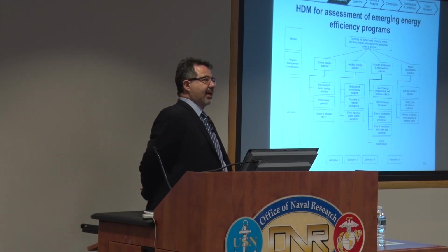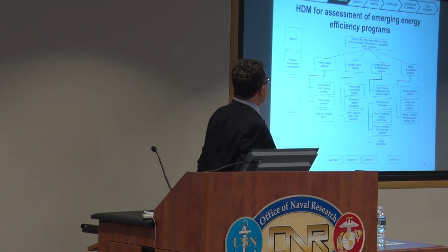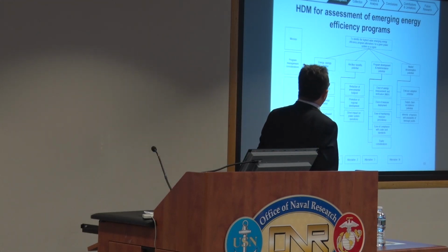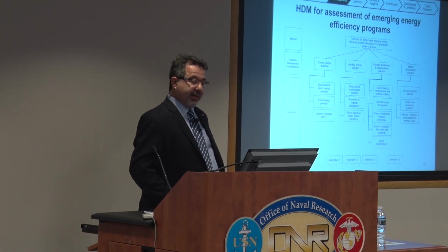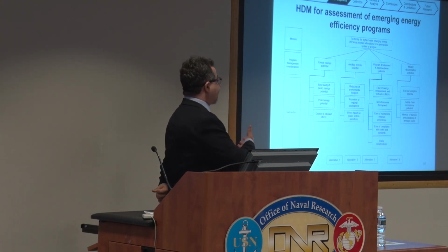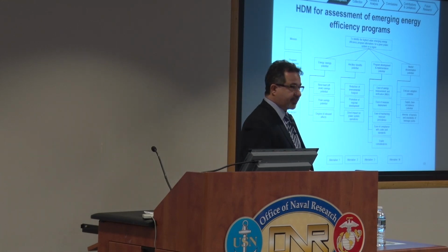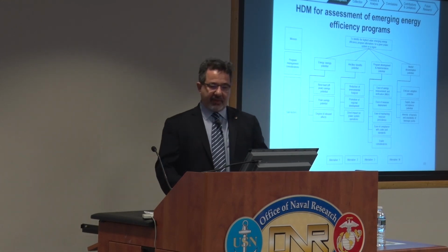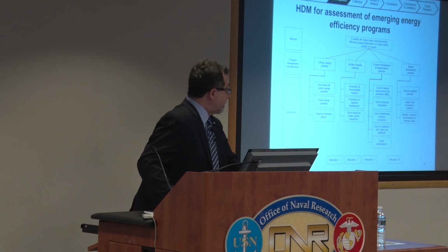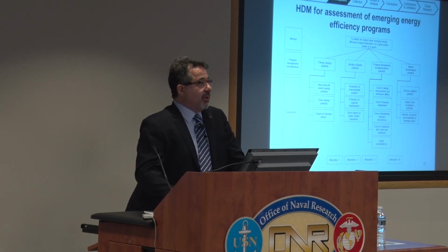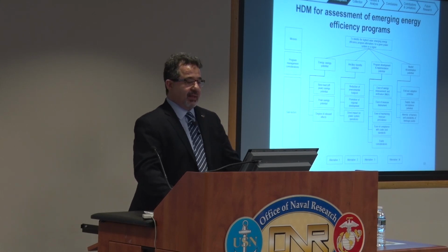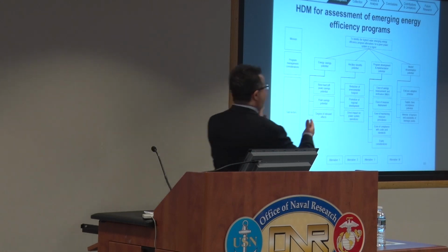Now, remember I mentioned the diffusion and the program. It was very clear in this analysis when we did work through that. And by the way, how do we identify these weights, right? In some cases, they are very much objective, and the value curves, definitely you cannot come up with them. You have to work with experts here too. So on average, we identify 30 to 50 experts depending on the areas we're looking at.